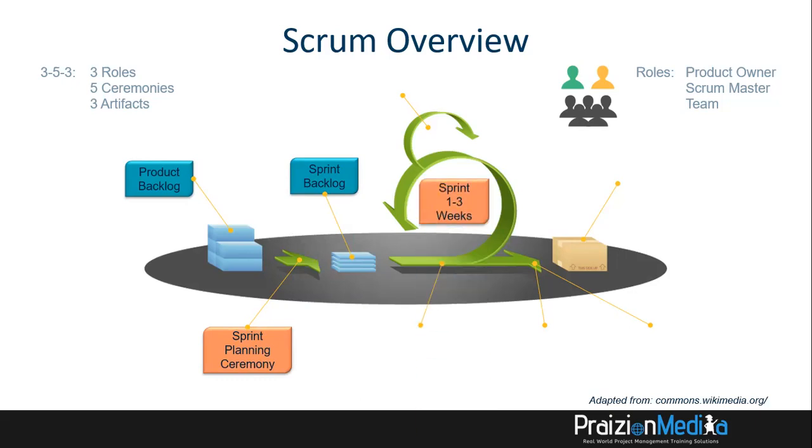Now, the sprint, historically, it has had anywhere from 1 to 4 weeks, but the sweet spot is actually 2 weeks. And I know up here it shows what the Scrum Guide once upon a time showed, but it's really 1 to 4 weeks right now in the 2020 Scrum Guide. So, anyway, sprint is up to 4 weeks. Some companies may use a lot less, some may use more.